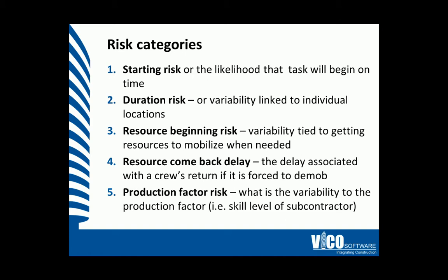Number four is the resources come back delay, or the delay associated with the crew's return if it is forced to demobilize. And finally, number five is production factor risk, which is the variability of the production factor — for example, the skill level of a subcontractor.